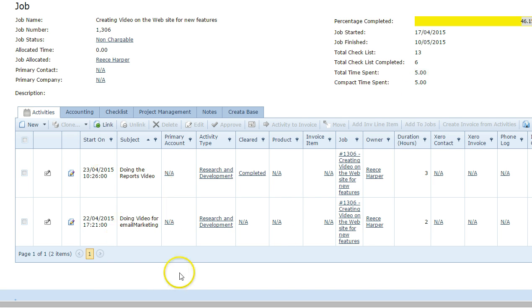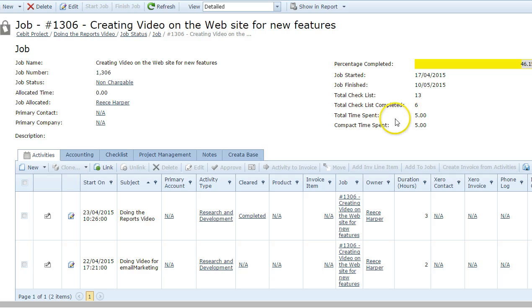Now, the great thing about this job is that you can actually allocate time here, in this section here, of how long the budget was for the time. So it gives you a percentage of what's expected for this particular job versus what did happen. That helps management understand. Sometimes we quote a particular resource to do something and then find out it exploded because of a lot of the unknowns. And this information is very important for management to understand how particular quotes need to happen for businesses.